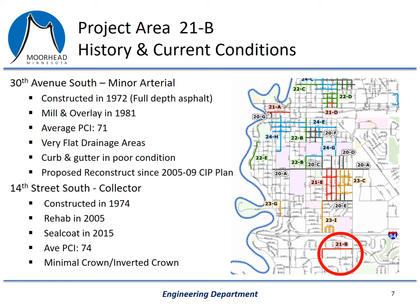On this slide, I've got the history and current conditions of 30th Avenue South and 14th Street South. There is a picture of a portion of the city's five-year CIP map, and you can see project 21B circled at the bottom — that's 30th Avenue South and 14th Street South. 30th Avenue South was constructed in 1972. There was a mill and overlay in 1981, but there hasn't been any major maintenance performed on the street since then. The average PCI for this stretch of road is 71, but there are some other significant issues: the road and curb and gutter is very flat, which doesn't lend itself to good drainage, and the curb and gutter is generally in poor condition. This road has actually been on the city's five-year CIP plan since 2005 but has been delayed repeatedly because of funding concerns.